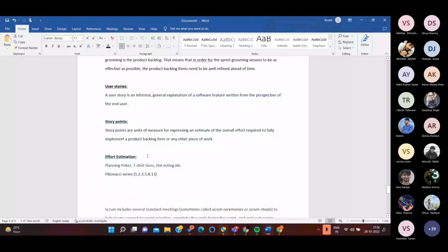So next come the epics. Before moving on to user stories, there are epics. An epic is the greater idea of the things that need to be done. For example, if there's a bigger project, one milestone contains the homepage, which would be designed in that particular milestone. In that home page, there's also a payment module. So if we take the payment module, it would be an epic.